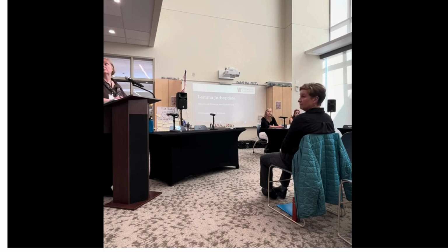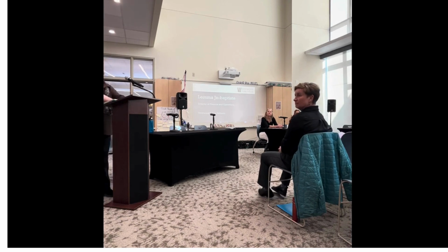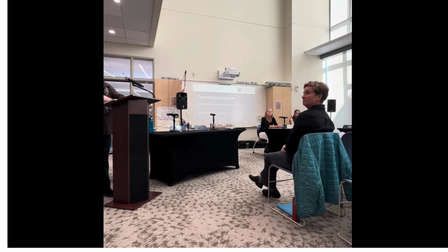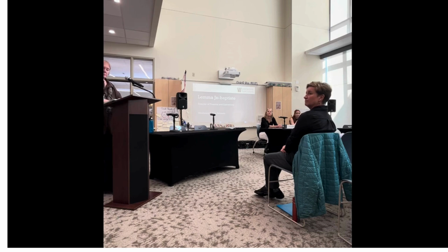Can I just add to that? I just wanted to add about the domestic content. About the domestic content, from an architect's perspective, that is important, because if you want to integrate it into your specifications and have it go out to bid that way, it is a publicly bid project, right? So the other thing you have to think about is, if we include that language in there, are there 3 other manufacturers that can all provide that domestic content and meet that criteria? So that's the other layer of unknown in that domestic content question.